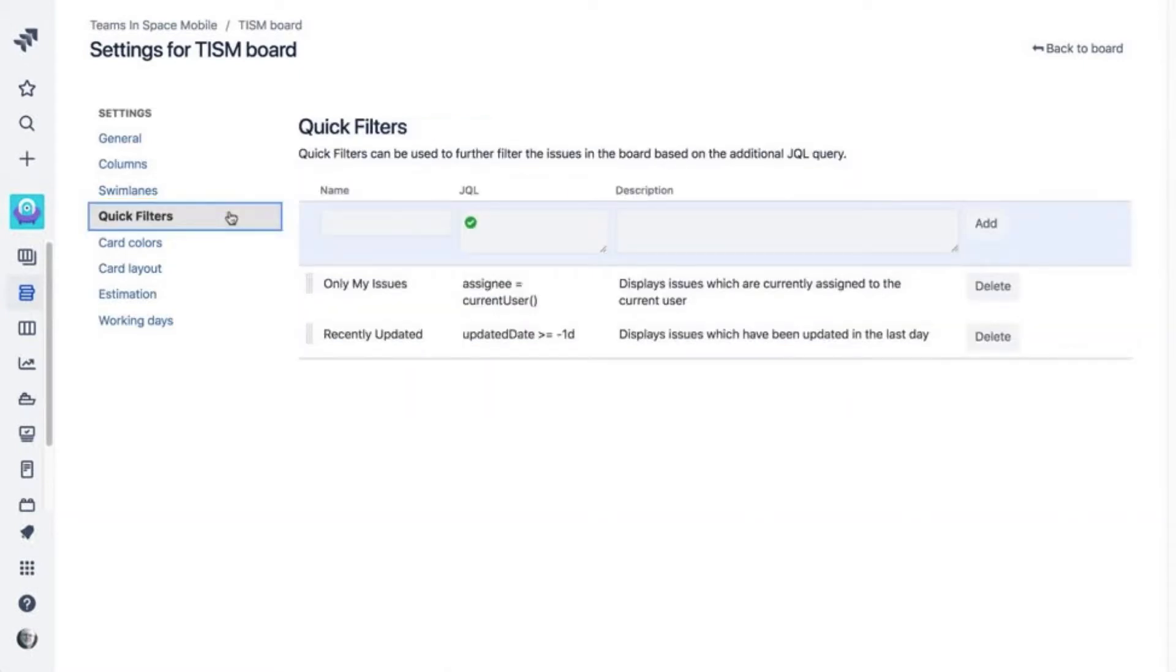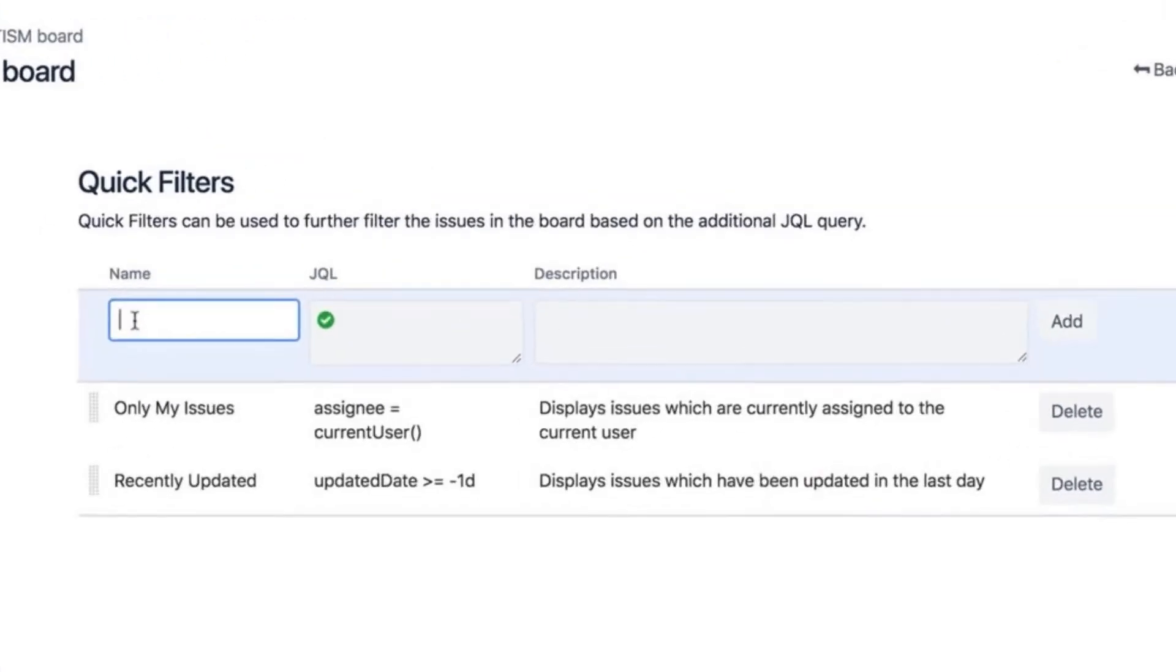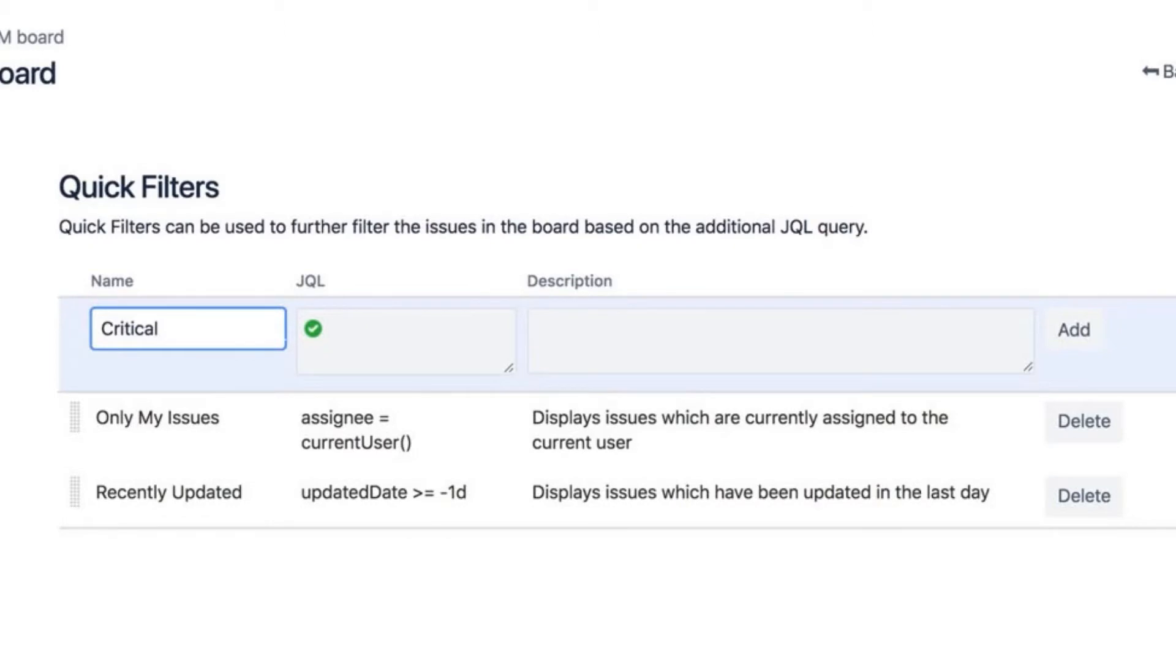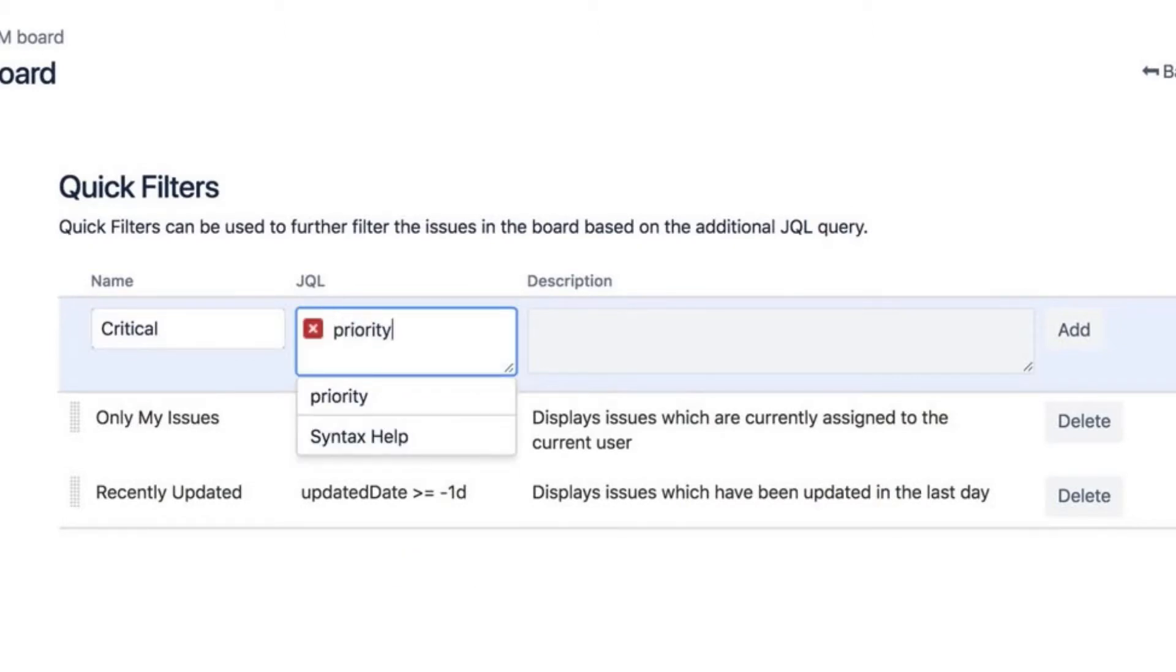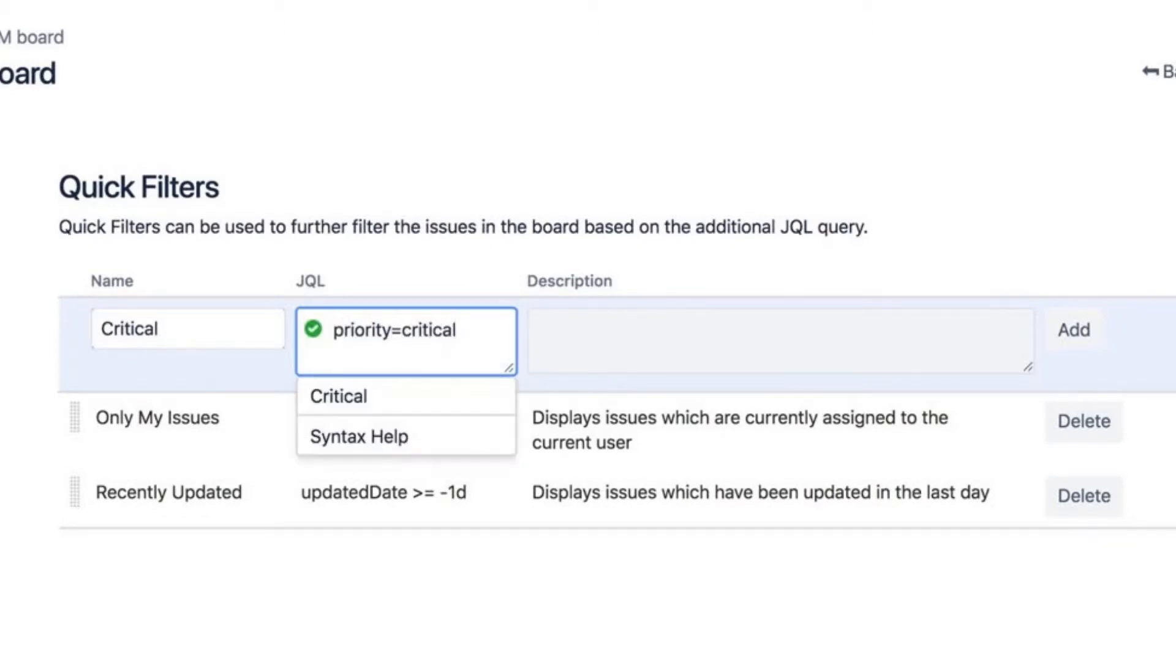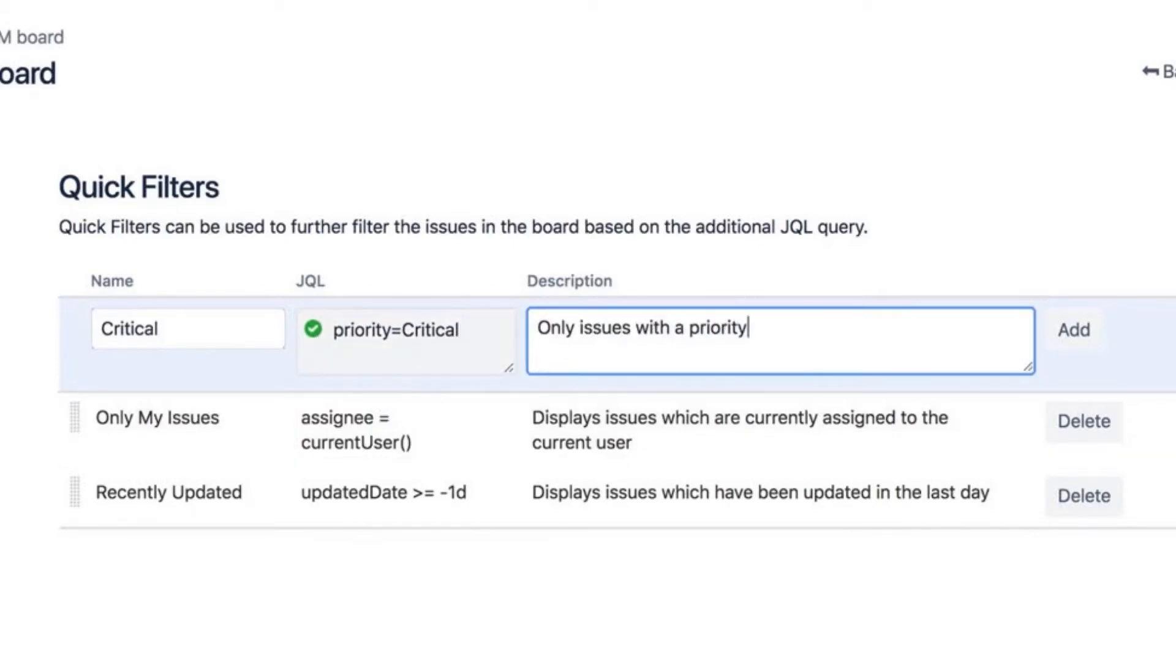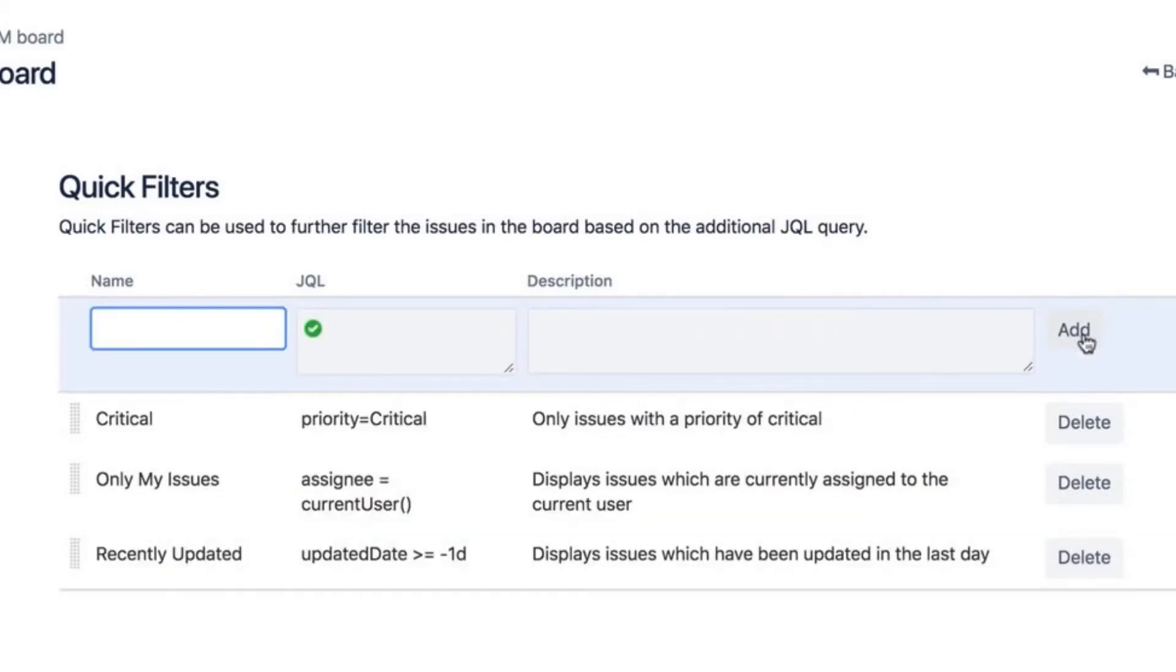Let's start with an easy one. Create a quick filter for all issues that have critical priority. We'll name the filter Critical. In the JQL Edit box, enter Priority equals Critical. Give your query description.